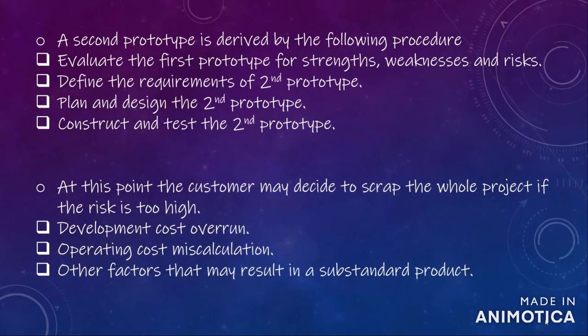A second prototype is derived by the following procedure. Evaluate the first prototype for strengths, weaknesses and risks. Define the requirements of second prototype. Plan and design the second prototype.